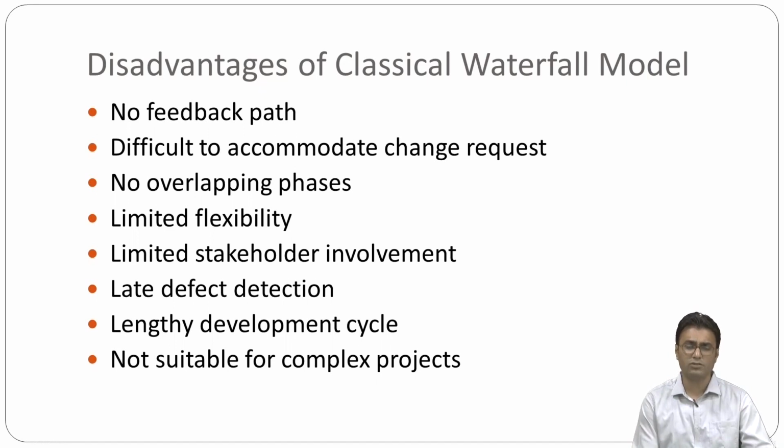Then the next one is difficulty to accommodate change requests. Here we can say this model assumes that all the customer requirements can be completely and correctly defined at the beginning of the project, but actually customer requirements keep on changing with time, right? So it is difficult to accommodate any change request after the requirement specification phase is completed.